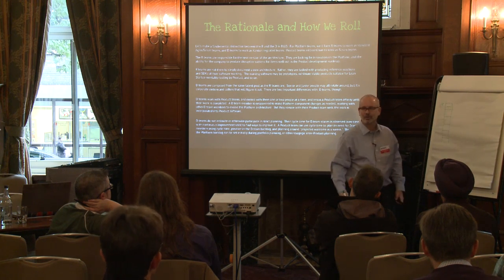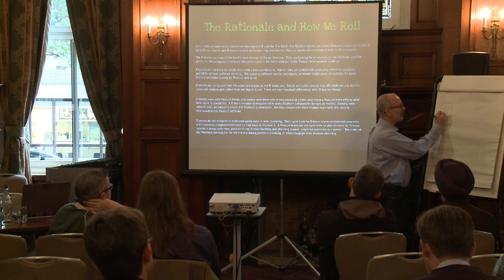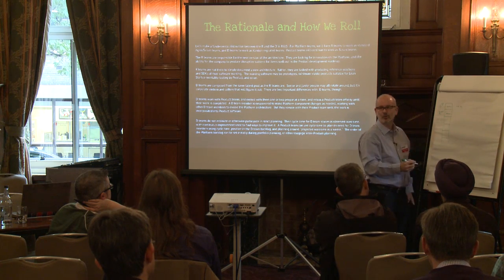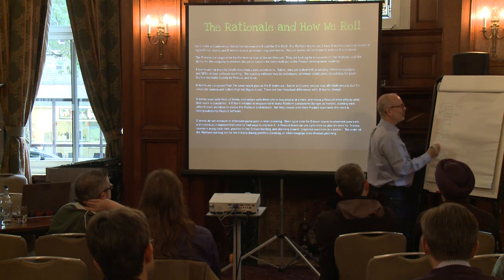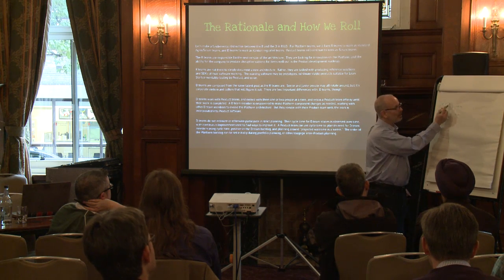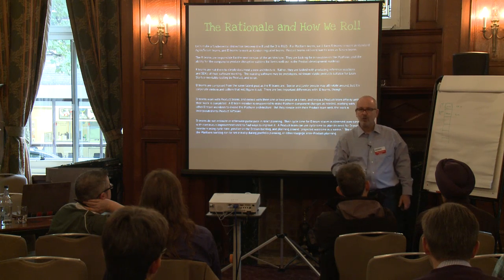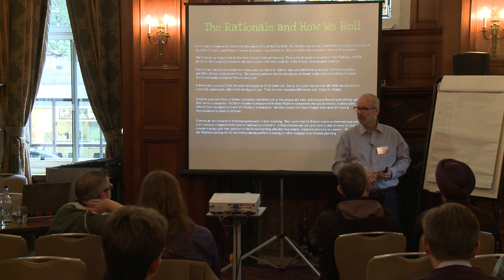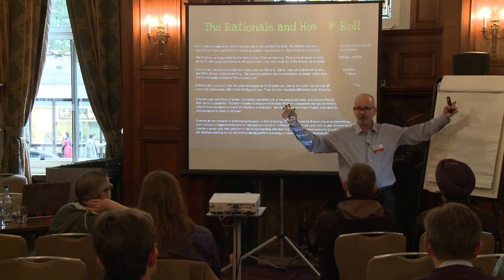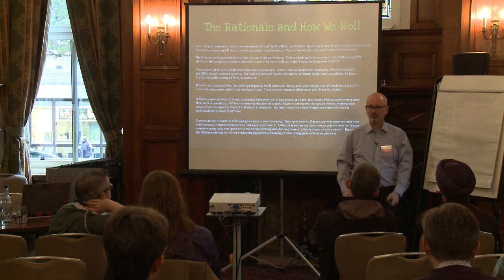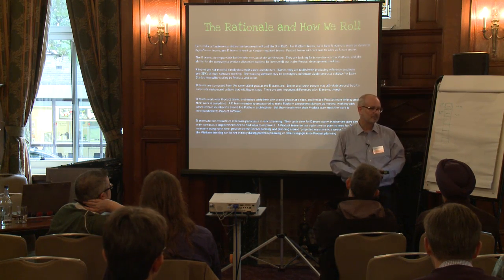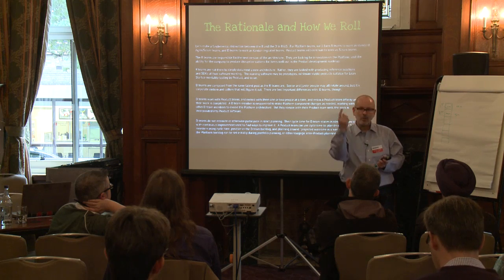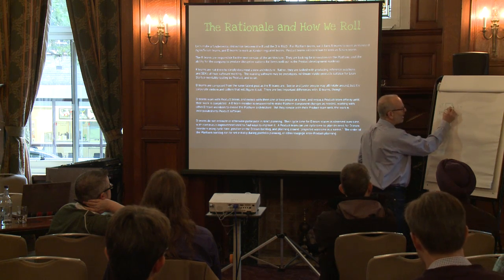But whatever it is, there's something that's the top on the list. It's some kind of project over here. All right, there's something that's kind of second. It's the next product that's important. Perhaps this means 10 million to the organization, and this means 5 million to the organization. All right. Embedded inside that initiative are a number of concerns that have platform issues on them. We kind of know them, know a little bit about them. Right? The cone of uncertainty says that the estimates for them are going to be huge because we don't know too much about them.